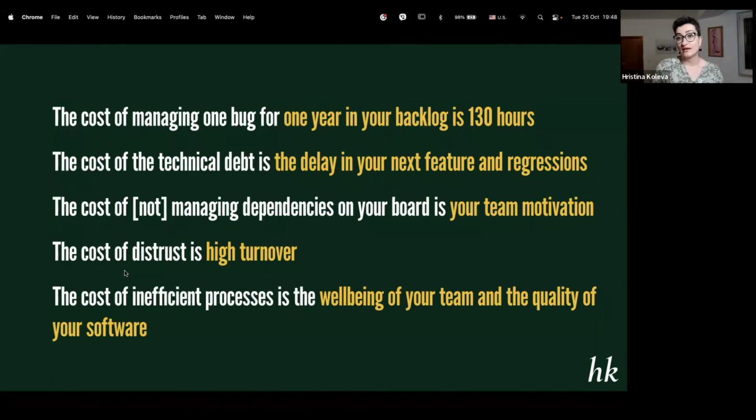The backlog should be clean. It should only contain the highest priorities, the most critical items that the team is about to be working on in the next very short time in the future. Not the entire roadmap or product vision. There's no place for it in the backlog.